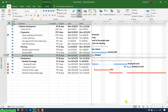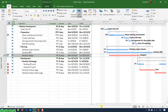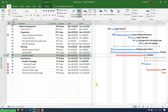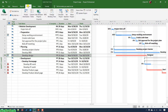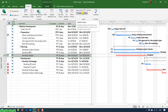Microsoft Project will help you to calculate it automatically. In the menu navigation, click on the Project tab, then navigate to the Status section, and click on the Update Project button. When you hover over the Update Project button, you can see a tooltip that says this will help you update progress information and reschedule work for some or all of the tasks in the project plan. Go ahead and click on this button.